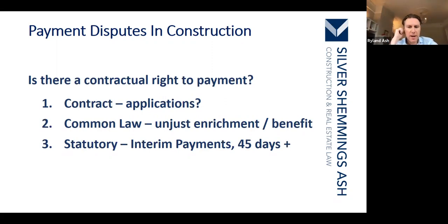Now, most contracts that involve provisions that allow for interim payments will have provisions for applications for payment. So an application goes in by the person claiming money, the payee, and then that is to be assessed by the payer. But of course, some contracts specify the type of application or the nature of it, or the content, the form, and others don't. If they specify a particular form, then you're going to have to comply with that.